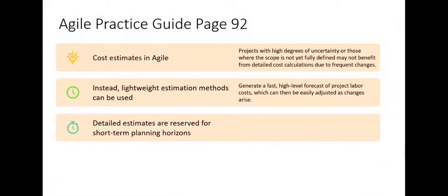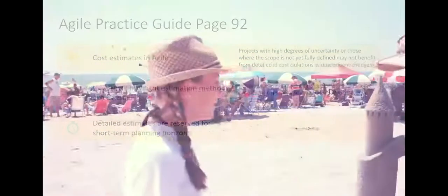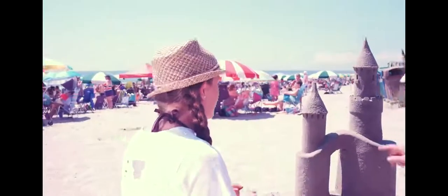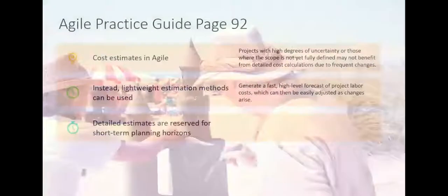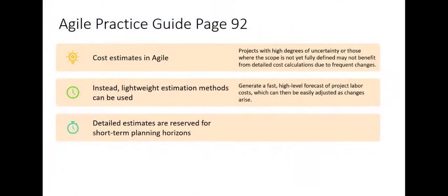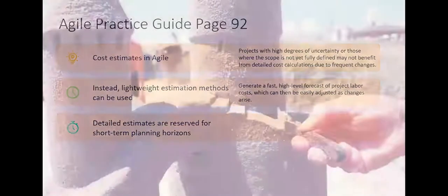Instead of planning everything in detail regarding cost, even schedule, lightweight estimation methods can be used, and more so in cost. Schedule, we could get away with iterations and understanding how the iterations will pan out and what we try to put in that bucket of time. But when it comes to cost, we need to generate a fast, high-level forecast of project labor cost, which can then be easily adjusted as changes arise.